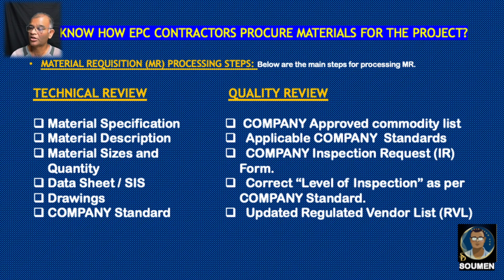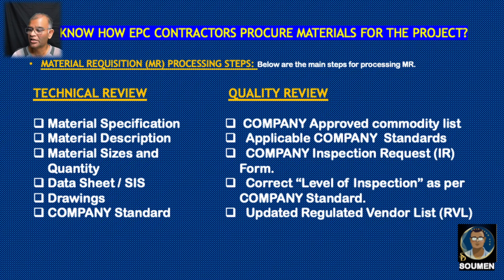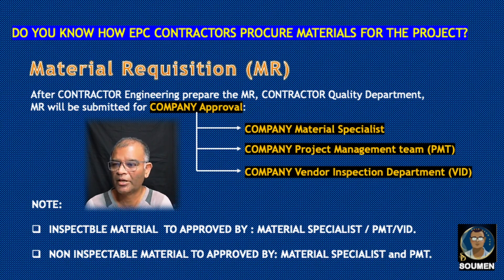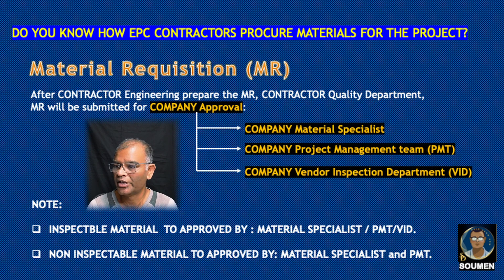Quality staff will review the company-approved commodity list — the material we are ordering must match specifications from that list, and applicable company standards must be complied with. The correct level of inspection must be selected as per company standards using the inspection request form. The updated regulated vendor list must be verified — are the materials selected from the company's updated regulated vendor list? The MR requisition goes through company approval: first to the company material specialist, then to the company Project Management Team (PMT), and final approval comes from the Vendor Inspection Department (VID).